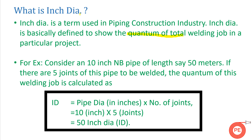How to calculate inch dia? Here I have considered an example. Suppose we have a 10 inch NB pipe and its length is 50 meters, and there are five joints in the pipe that need to be welded. The formula is: Inch Dia = Pipe Dia (in inches) × Number of Joints. So here, pipe dia is 10 inch and number of joints is 5, giving us 50 inch dia.